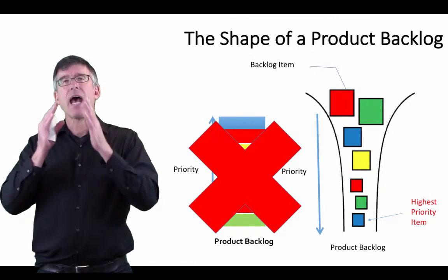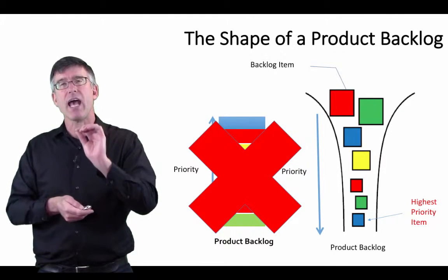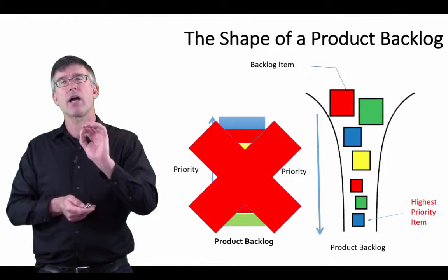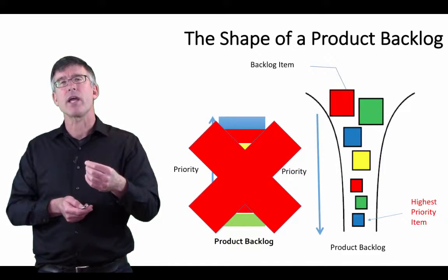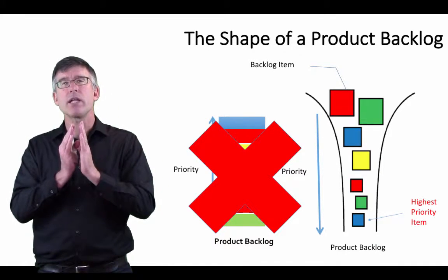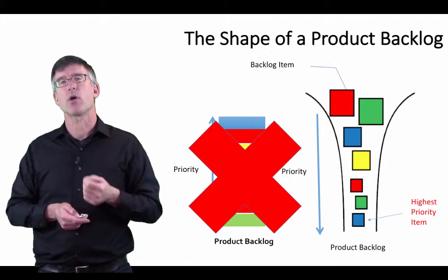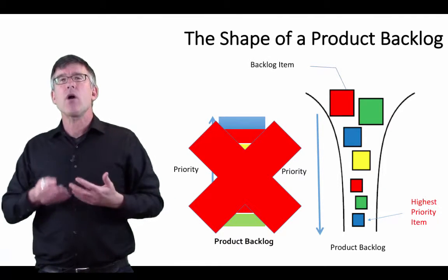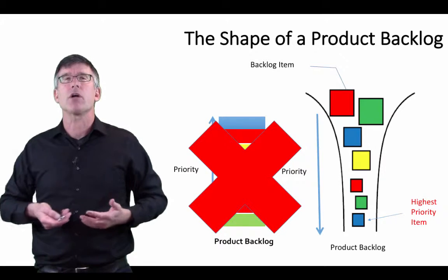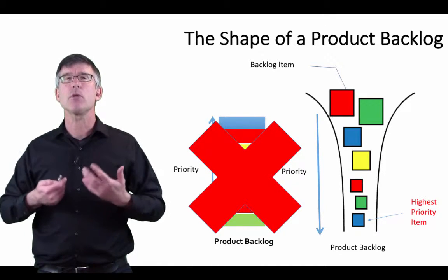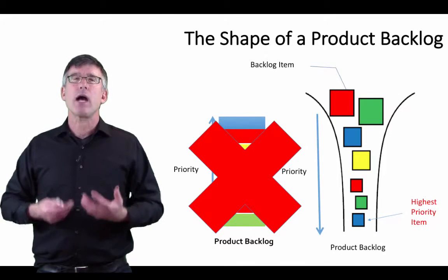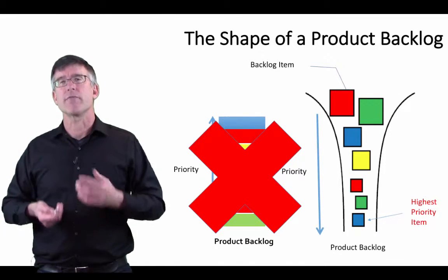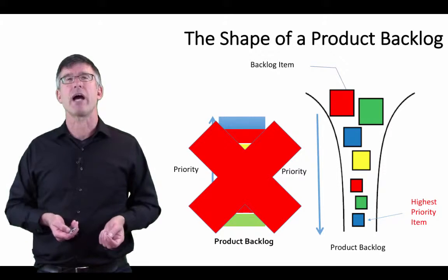And then as time progresses and as backlog items are getting ready to be implemented, they're much more fine-grained in scope, and also much more concrete. So this is why we've adopted this rock crusher model, because we think it's a little bit more revealing and indicative of how a backlog should really function, rather than the so-called stacked plate model.